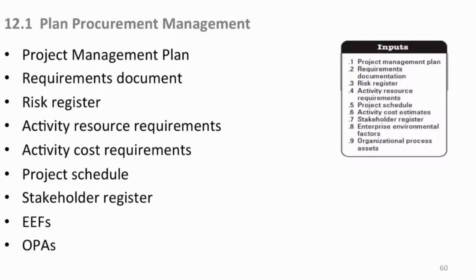when you need these things delivered, so you don't delay other areas that are dependent on that deliverable from an outside source, or even within your company with an MOU. In fact, sometimes even within your own company is more difficult than getting something from an outside company because, with an MOU, you're most likely not legally bound. It's an ethical professional obligation that they'll give you what you need to fulfill your project. So that may be a more difficult vehicle to manage than a third party who's legally bound, who's looking for financial compensation. So watch out for that.